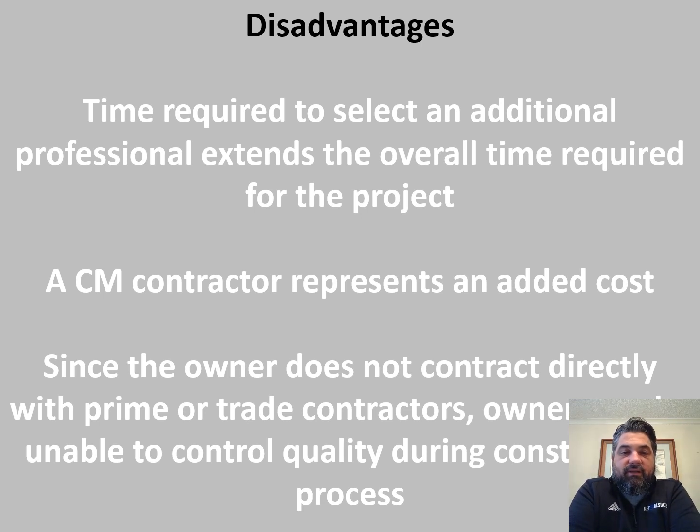The time required to select an addition, these are some disadvantages. So oftentimes the construction manager is selected much like the architect or the engineer is, where there's typically a process where they will request qualifications. They will request a fee for overhead and profit, which is usually delivered in a percent of the cost of the work, which is all the subcontracts together, plus the general conditions. And so it takes time to work through that.